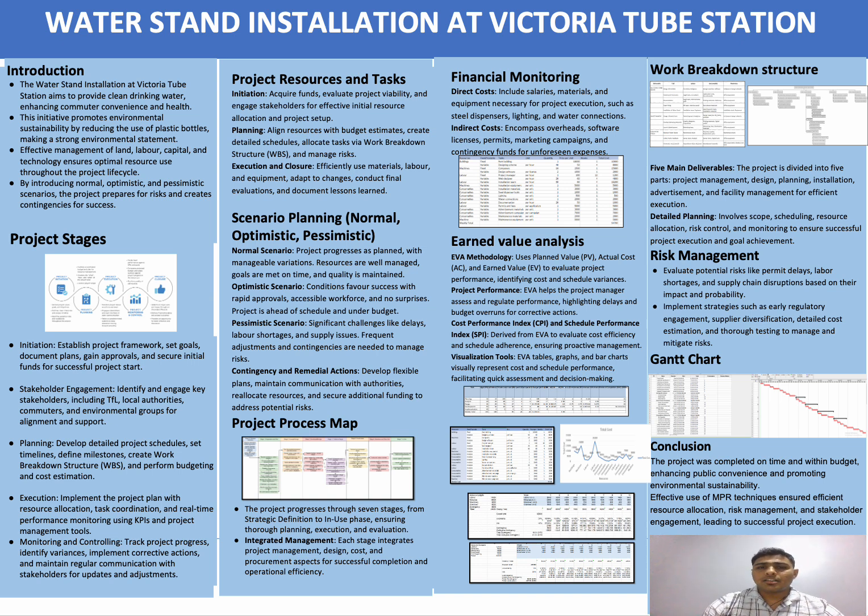In developing the assessment, I utilize the following element. First one, resource element. I identify all necessary resources, including labor, material, machineries, and overhead. Each resource was categorized as fixed or variable, which helped in planning the budget accurately. Second one, cost estimation. Detailed cost estimation were developed for each resource. For instance, labor cost were calculated based on hourly rate and the total hour required for each task.